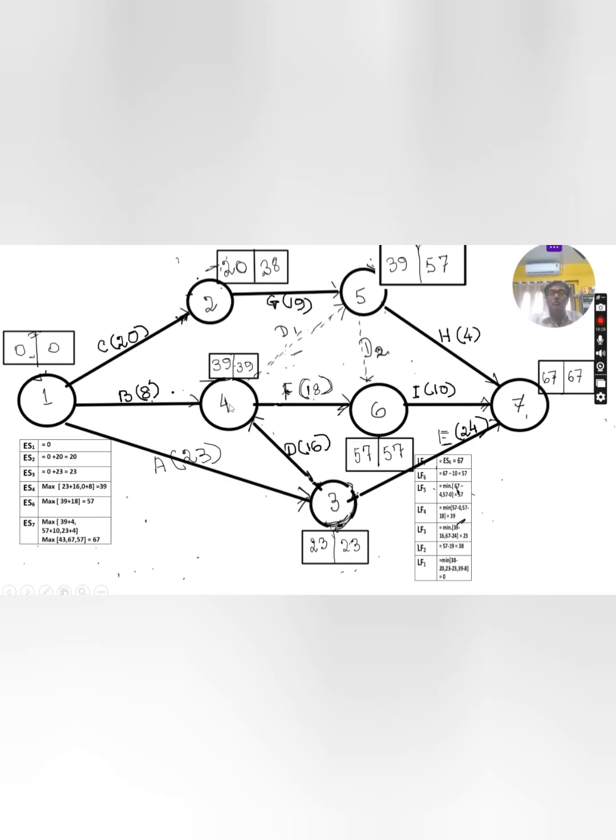Now next is 4. Which activities are coming out from here? Which are the activities emanating from this node? 4, 5 and 4, 6, two nodes. So input, these two activities are coming out from here. You must have to complete all these activities. What will be the latest finish time? The latest finish time for this is 57 minus 18. 57 minus 18 is 39, and this is 57 minus 0. The time value of dummy is 0. That means both are 39. That means the minimum in this case is 39.